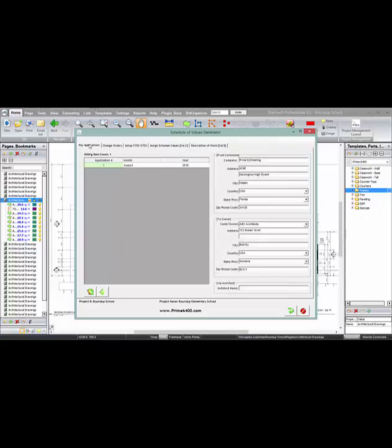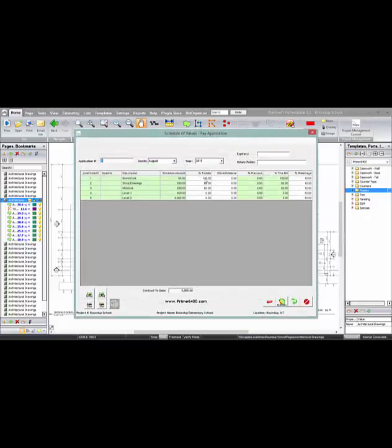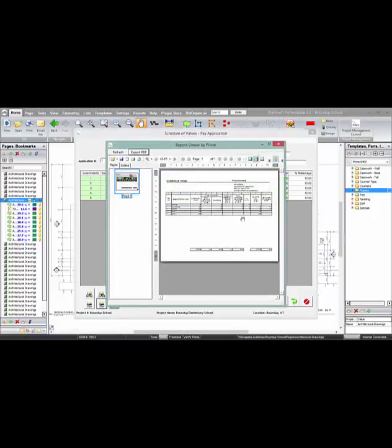Once it's been locked, we can actually go to Pay Applications, and again, looking at an existing one, merely fill in the percentages to date that have occurred on this project. There is an area also for stored materials. Once that's done, we do have an area here for generating the report. This is a draft format that we can use. Again, print or PDF as necessary.